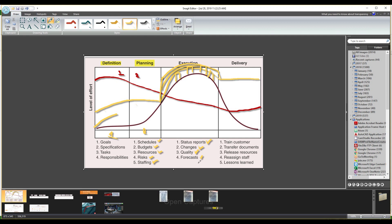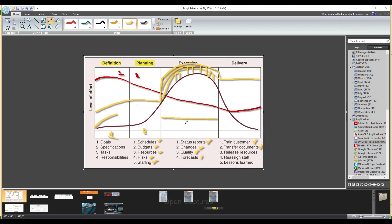In the final delivery phase, you will handle customer training — that is knowledge transfer — and transfer documents so you can do operations and documentation. You will release resources, reassign and unassign staff, assign support staff, and do the knowledge transfer. You also document lessons learned.